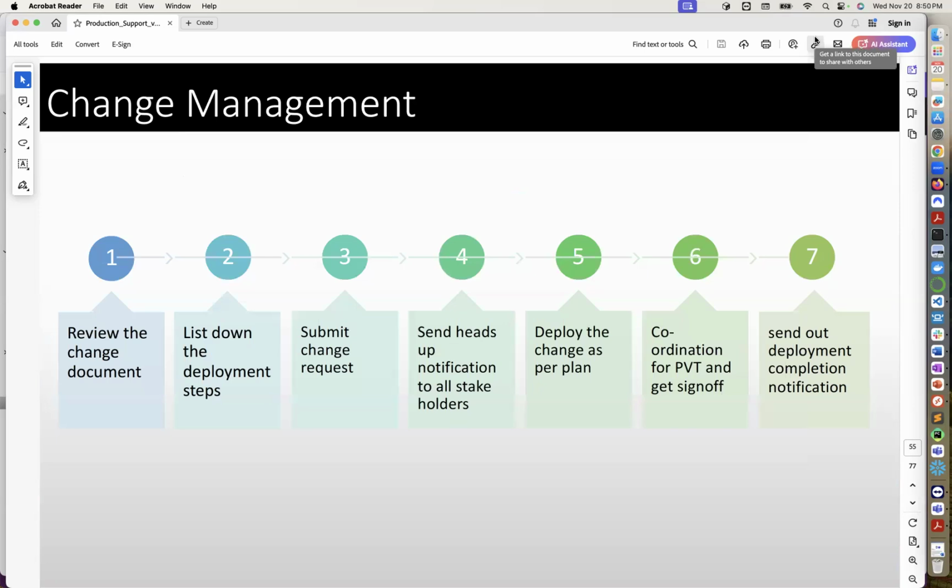This is a separate ServiceNow ticket that is assigned to L3 support. Me, we have to review the change documents. We're changing the application from Linux to Windows. We're going to schedule the change. It's going to happen over the weekend, or we're going to have a downtime. We have to communicate to the company that, dear company, we'll be having a downtime for application version this. We're making a change, so the system will be unavailable between the hours of 1 p.m. on Friday to 7 p.m. on Sunday. That's the window. We're going to email that to the whole company, be a mass email.